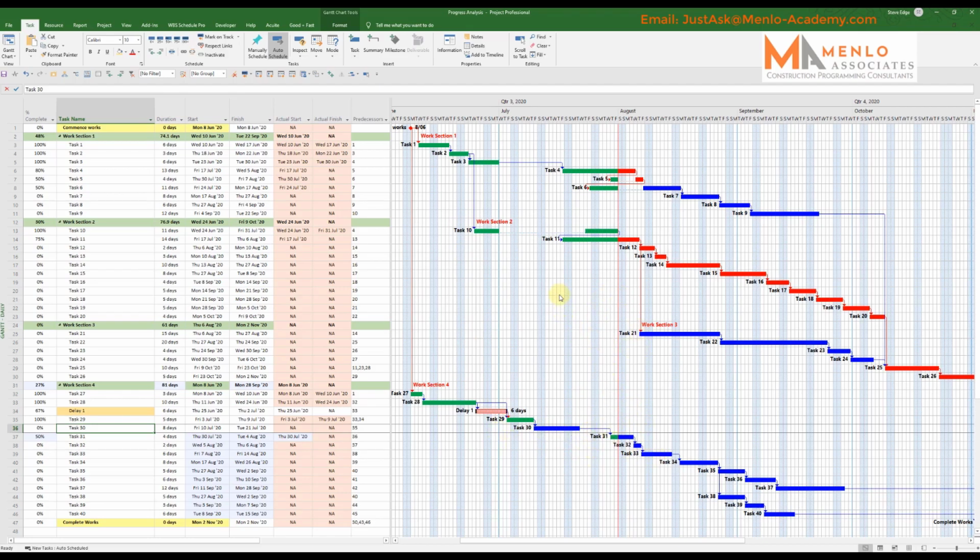But what I do when I update my program now is there is another button in the project tab which says update project. So I update all of my progress. The things that haven't progressed, I want them all to move up to today's date, because this can't start 3 weeks ago. It can only start the earliest today, or in fact, since this is a Friday afternoon in this case, it would start Monday morning.